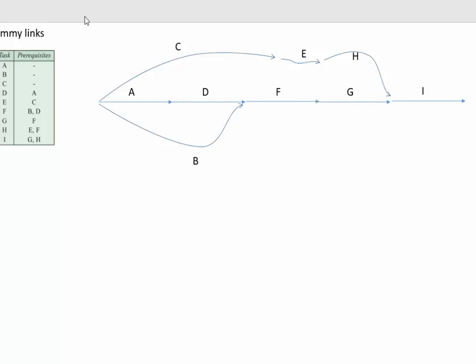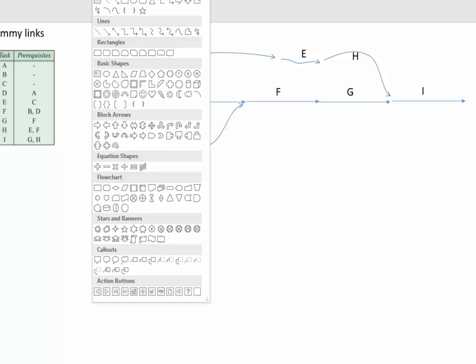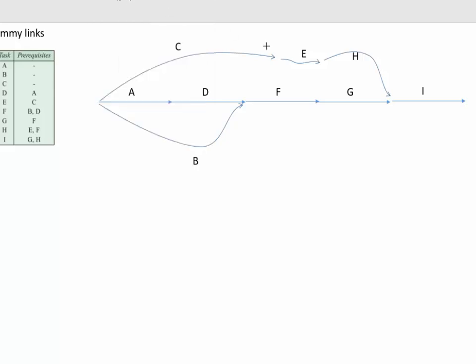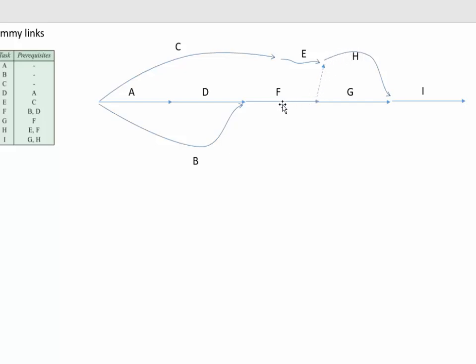So I put in something called a dummy link, and I'll do that with another arrow, but my arrow needs to be a dotted line. So I'll just change that to a dashed line. That dummy link shows the flow of activity from F into H. H requires F. But it doesn't show a connection between E and G.